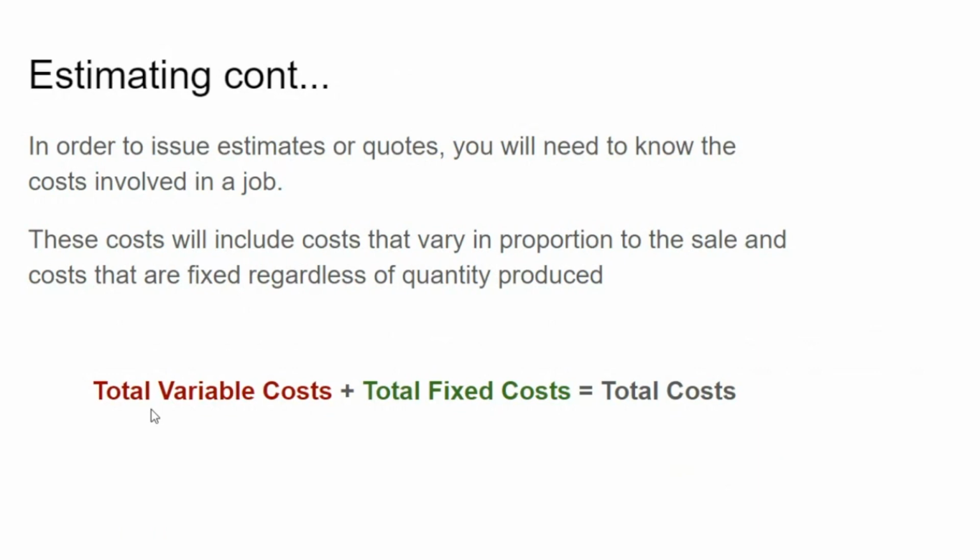If it's a $300 piece of stainless steel, you're going to buy 2 of them. That's $600 of stainless. So those are variable costs, and variable costs are relatively easy to track because you can tell I'm going to need this per unit. So you just add up all those items, and voila, you have your variable costs. The one that's a little bit more challenging to calculate is your fixed costs, which are sometimes called overhead costs.